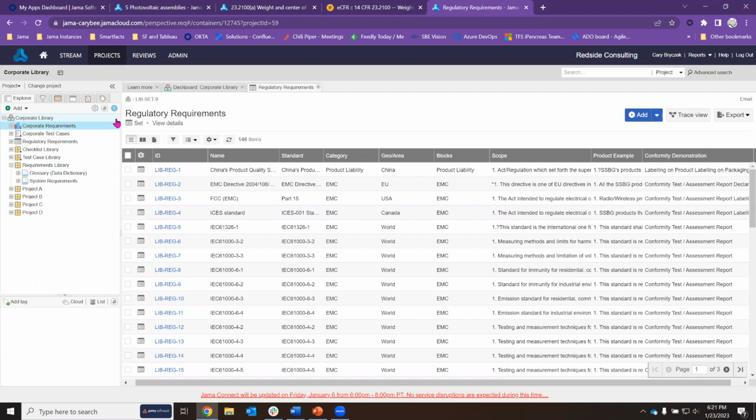So then, if they want to go look at all their product requirements, all the ones that were selected would show up there, and then they could select which ones they think apply individually, and then they could drive well-formed requirements to meet the intent of that regulatory requirement and establish traceability to it, as well as that chain of evidence that the design implemented that requirement, and then we have verification that the requirement was met. And at the top level, that compliance person would have access to the chain of evidence that says, yeah, we said you've got to be compliant with all these, and here's all the evidence that you were compliant.